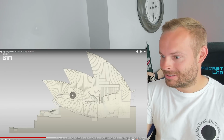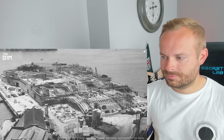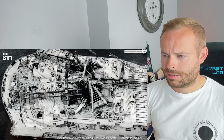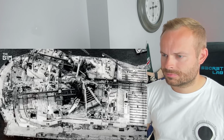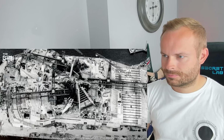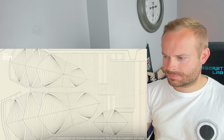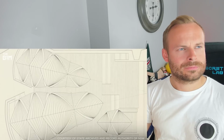In March 1959, construction began on some 588 concrete piers to support the 1.8 hectare building. By 1961, the project was already facing significant delays, and work was more than 47 weeks behind schedule, partly due to inclement weather, but mostly due to the lack of completed proposals. To give just one example of the impact this had, the support columns for the building's roof were installed before the roof itself had been designed.